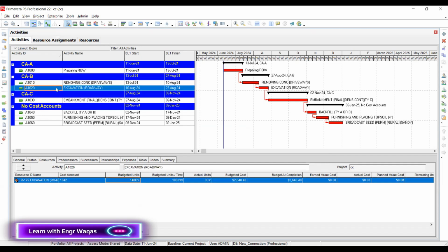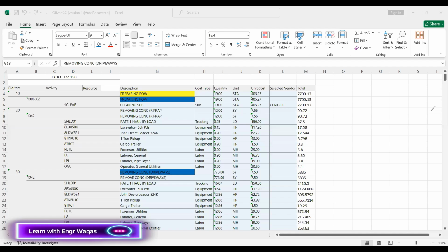See, these are your cost accounts, and I have developed these cost accounts on my own. You can give these cost accounts company numbers, 1006002104, whatever. Okay, you got my point? It's all depending on you. This is one way to track your project. This is the first way.